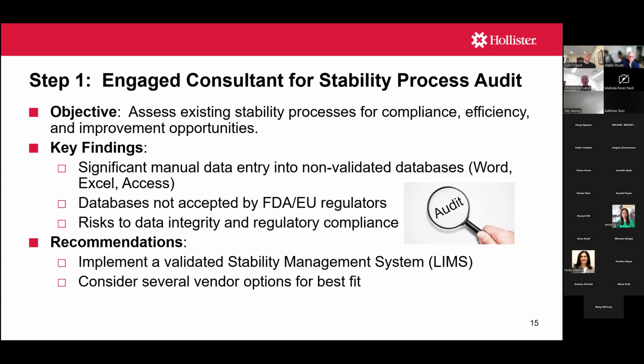So first and foremost, we hired an external consultant just for the purposes of auditing our existing, manual stability process. Many times at companies, you can talk to senior leadership and make recommendations, but many times it carries more weight if it comes from an external consultant. So that was kind of the strategy behind this. So we did engage an external consultant. He spent 2 days on site monitoring all these manual processes that I just talked about.